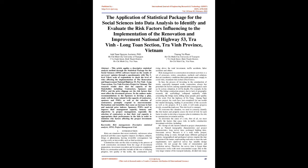and the price slippage are the risk factors that most affect the investment process. The authors make recommendations to the sponsors to develop a plan, study well the issues related to the capacity of contractors, sponsors, and PMUs, as well as the selection of contractors, promptly respond to macroeconomic fluctuations and instability that cause an increase in fuel and material price indexes. Sponsors and PMUs need to improve their management capacity, honesty, and objectivity in project management, especially the selection of contractors, so that their real capacity is appropriate to their performance in the bids, in order to minimize risk factors affecting the project investment implementation.